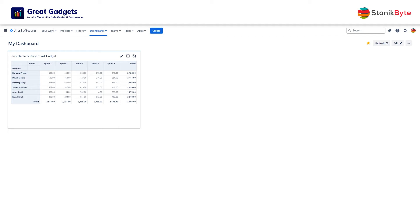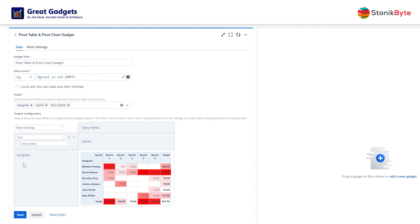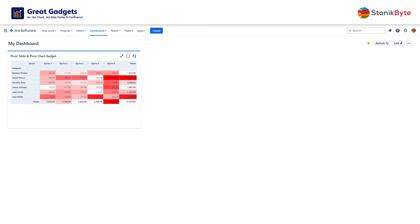You may want this table as a heatmap to easily identify the people who have been assigned the most story points. To do this, just edit the gadget and choose heatmap table instead of simple table. And look! The information is now displayed in a heatmap table.